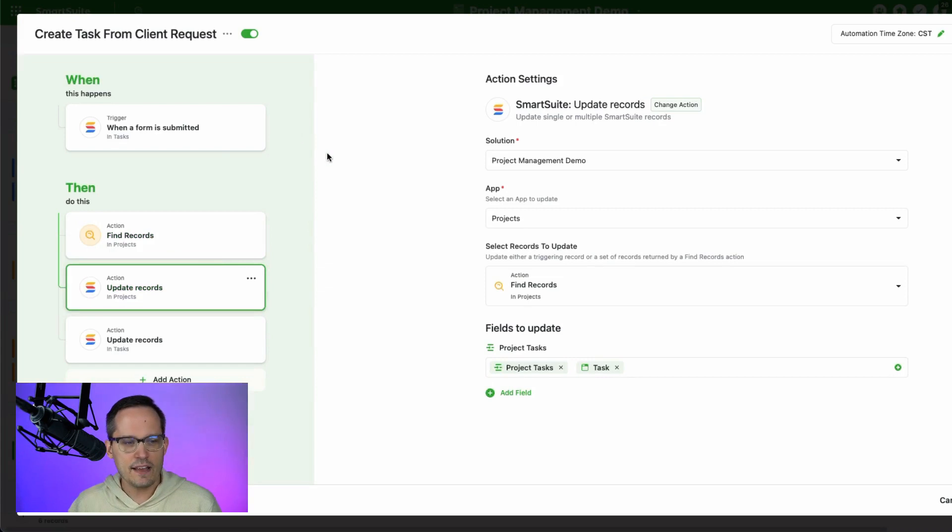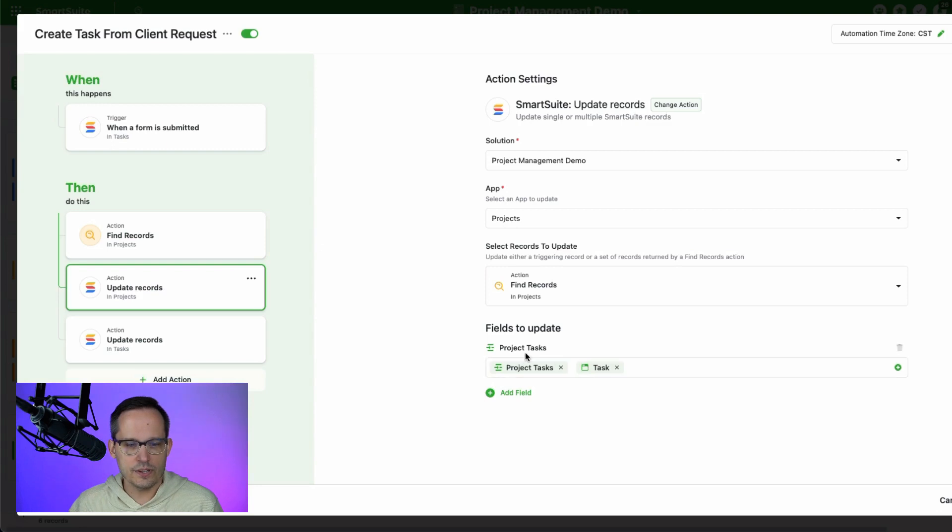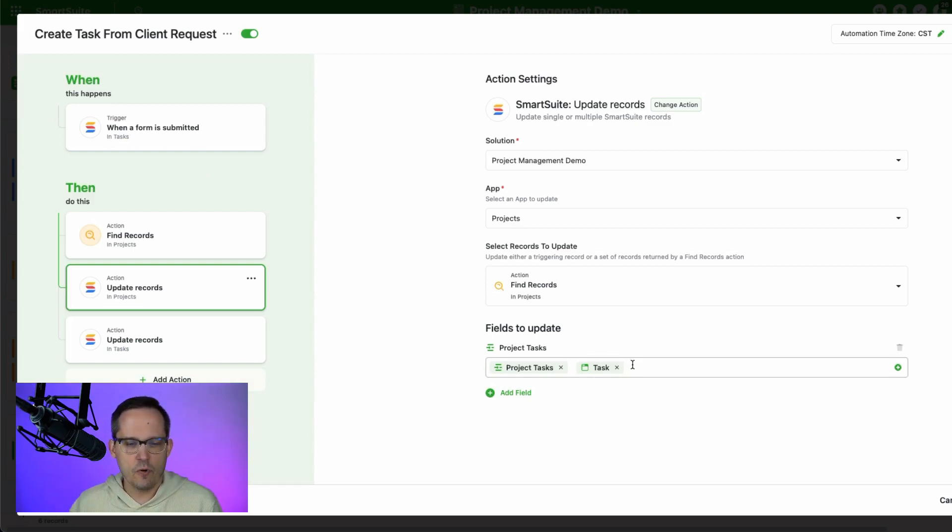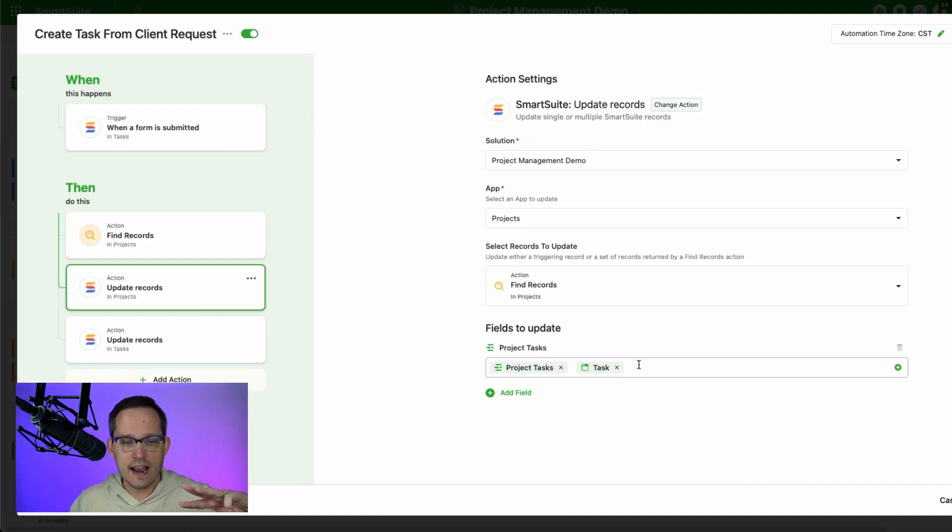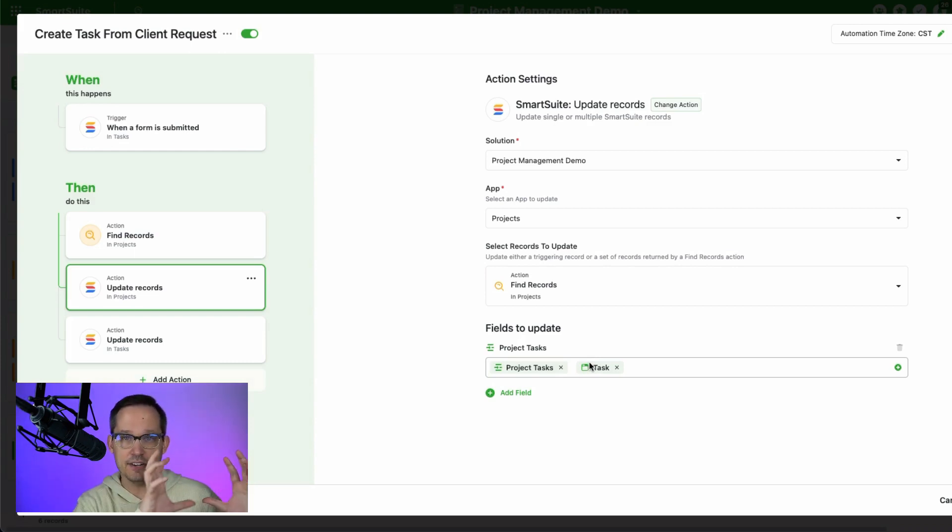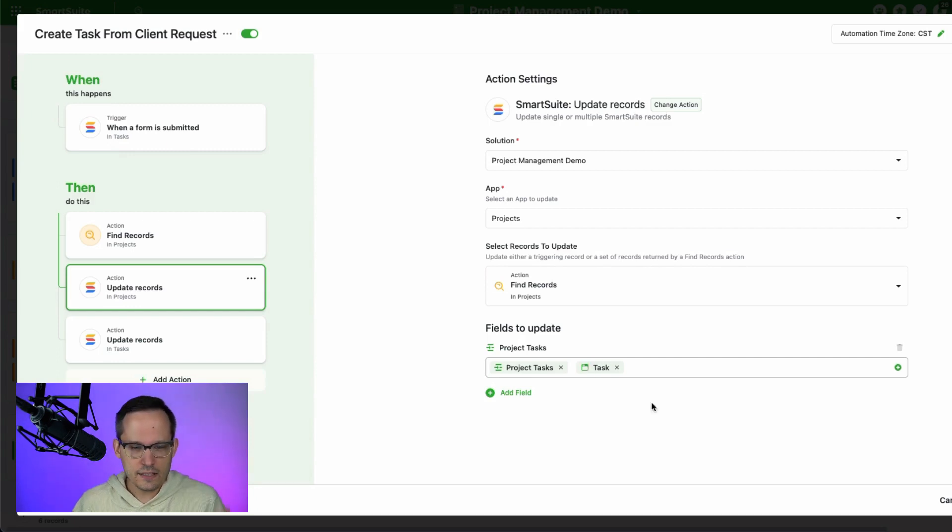Now I need to have an action step to update my project. And this is where I'm saying, okay, we're going to update the project that we just found, so that's the previous step. And what we're going to do is we're going to link the task from the submission to the project tasks. Now, if you remember from some of the other videos we've created in the past, we don't want to override the values. So if we already had three tasks for this project, and we just put in this new task, it's going to clear out those relationships, which is not what we want. We want to be able to say add a new task to those project tasks, as opposed to get rid of all the old project tasks and just have this new one.